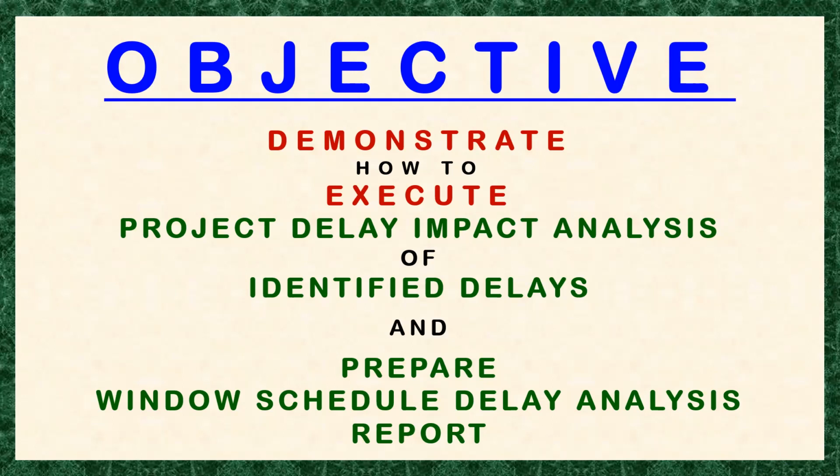There are also some delays, like for example the delay in the contractor's performance efficiency, meaning the efficiency of the contractor for a given period needs to be calculated to determine whether there is a delay due to the contractor's performance, which also has a contribution to the current period delays. So that is the purpose of why I put in here identified delays.